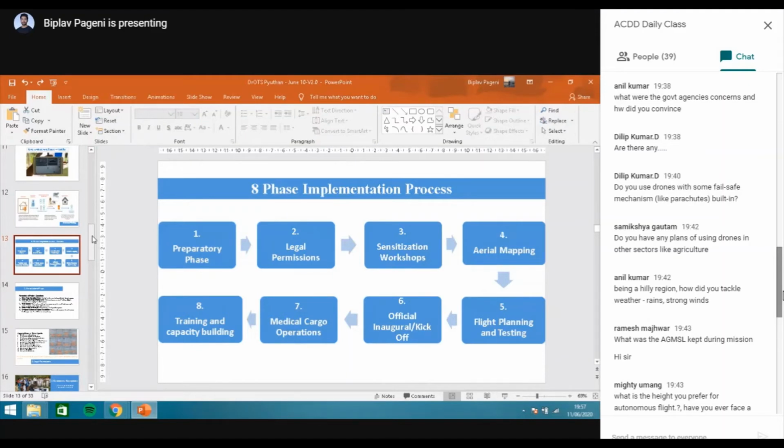So the three different agencies have three different kinds of safety concerns. In order to deal with them, when we deal with the Home Ministry, we arrange third-party insurance so they can be assured about safety for the general public and the damage the drone could cause because of any unforeseen activities. When we approach the Ministry of Information, these days we don't go with those kinds of frequency requests. We first try to research whether the drone could be operated with lower frequencies, and also maybe by installing more radio frequency devices along the way.